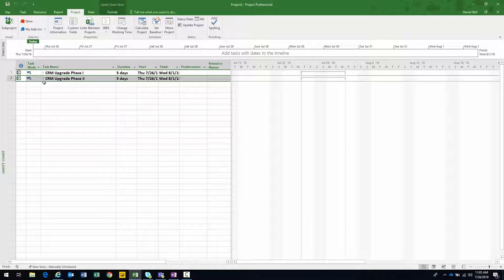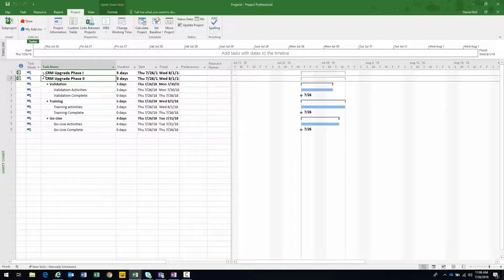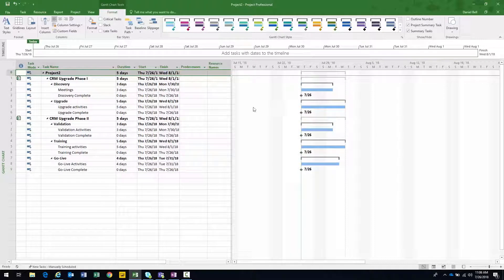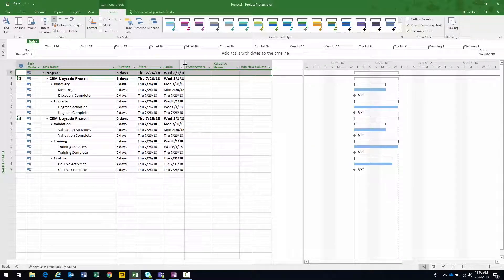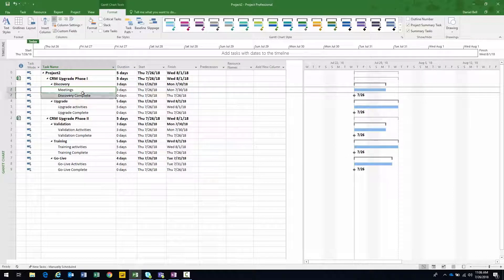So this is a temporary blank project — project two. I just use it to temporarily open up these two projects because this is the mechanism by which I create the relationships. I'm going to expand phase two, then expand phase one. You can insert your project level summary task here and expand the dates so you can see the overall start and finish date. They both currently show 7/26 to 8/1 because right now they both start and end at the same date. Notice in the Gantt chart you can see the whole schedule. I have no dependencies set yet, so we're going to set those now.